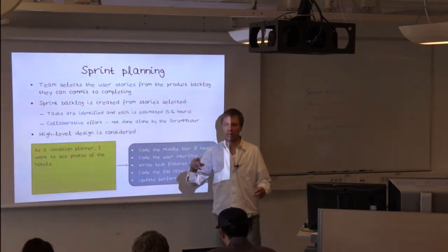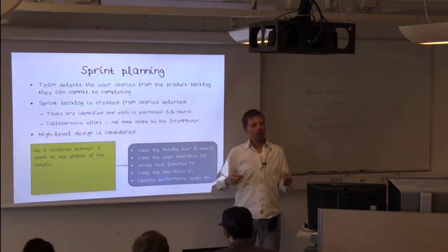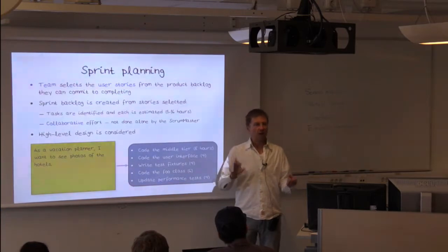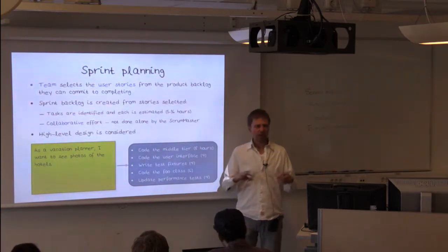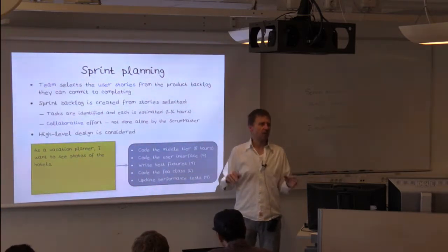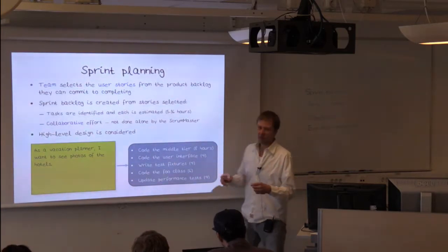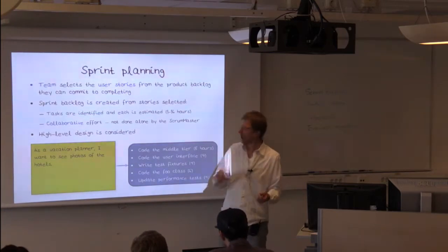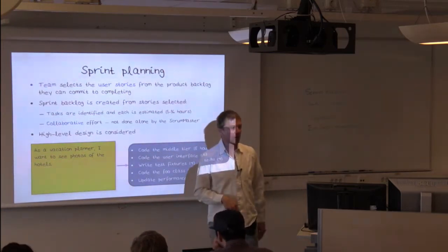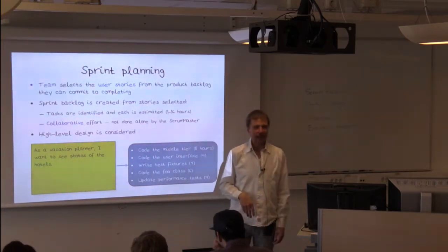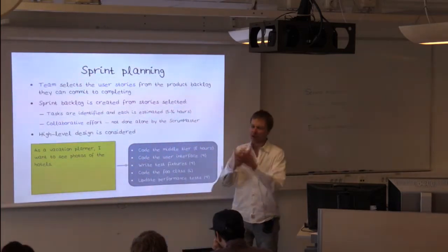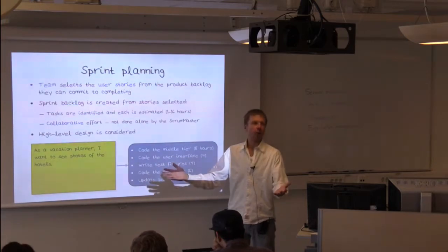So if you think about it, this is a part-time course. You're expected to spend 20 hours a week on this course. Say that 5 hours go away for a couple of meetings and admin kind of stuff, right? So you have like 15 hours left, right? If you were to take on a task here that's 16 hours, if you fail at that task, we're not going to know until the end of the sprint that you failed, and so everything turns to, you know what.